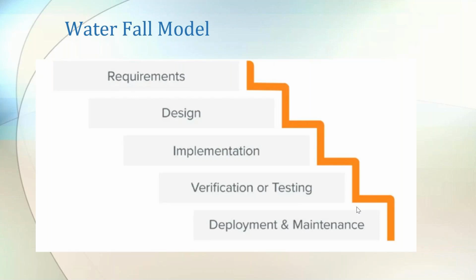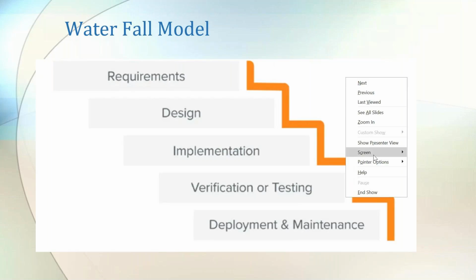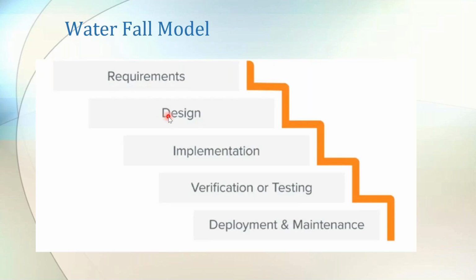Why we are asking all these questions is that we have to design the application. When you come to the designing part, if you have the requirement properly, you can design it. Once my requirement is frozen, only then will we start the design part. So once the requirement is frozen, the next step we start is the design, based upon the information gathered in the previous step.